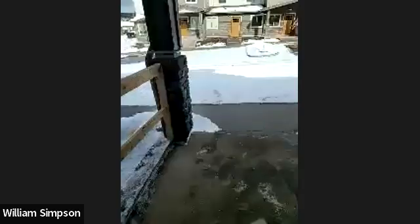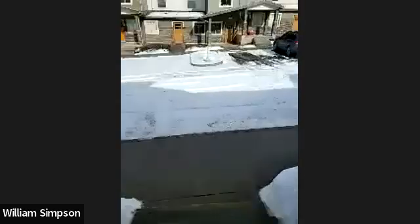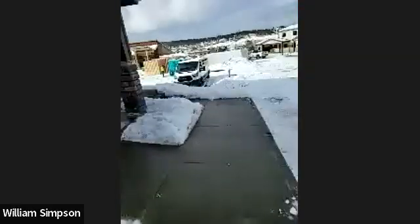When do you think you're going to be 100% complete? As far as the whole project? Yeah. I think they're telling me they're shooting for the end of March is what they're saying. Is there any other critical path items in question to getting to that? I mean, obviously weather and that sort of thing, but materials specifically. Biggest issues we've had is weather.